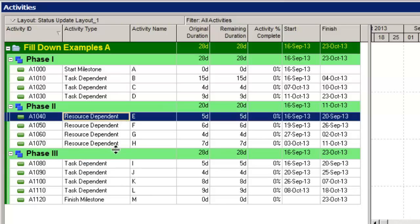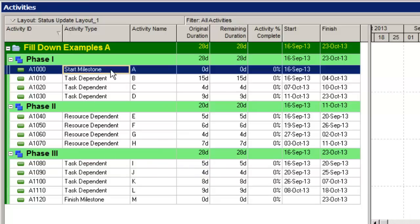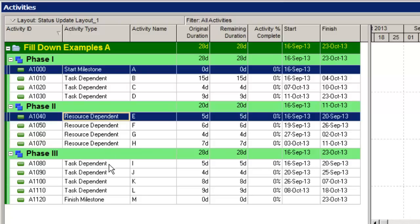The easiest way to do that is to select start milestone at the top, hold down the control key this time, and select E and I. And then do a fill down, and the start milestone value gets filled down to the selected activities only.